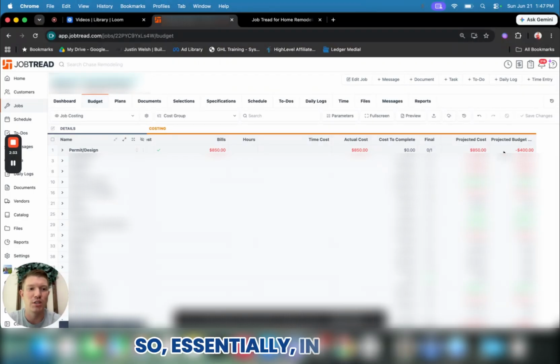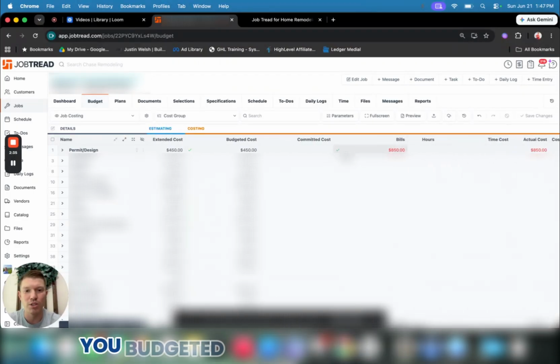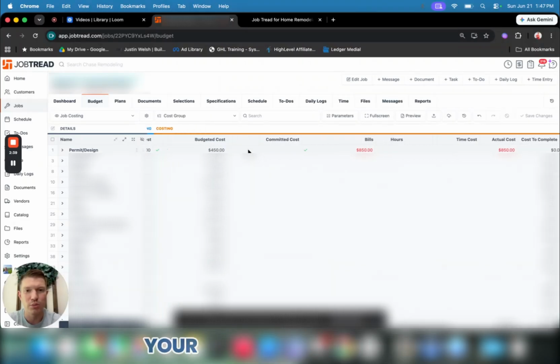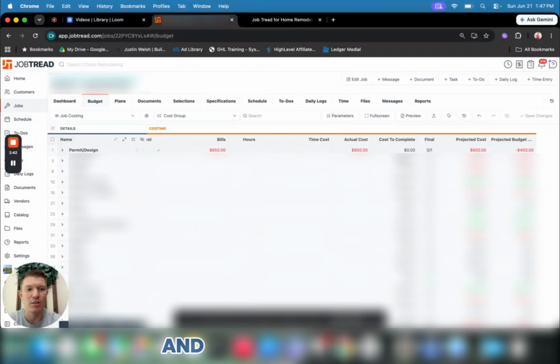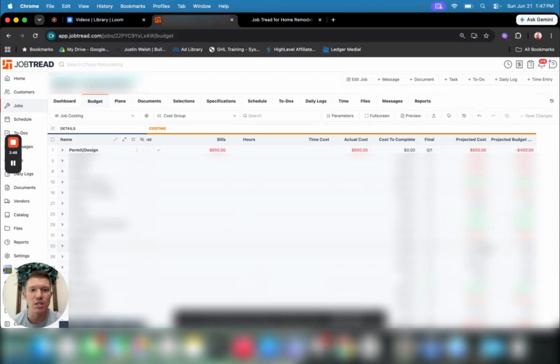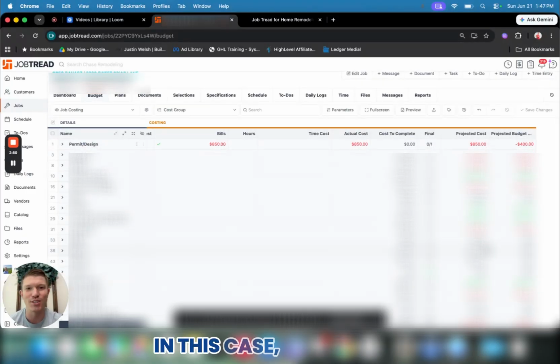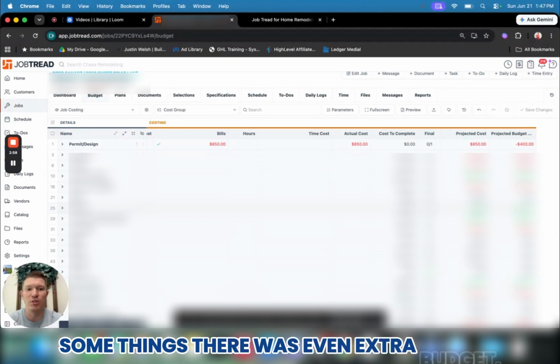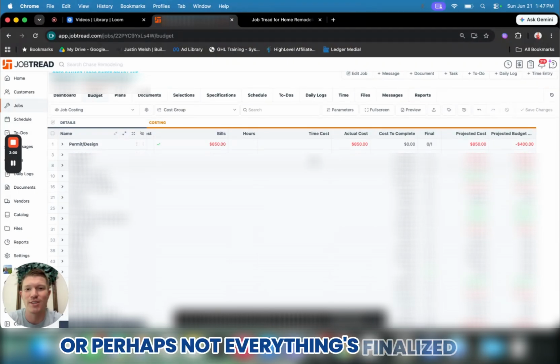So essentially, in this case, you budgeted, if we go back over here, your extended cost was 450, your budgeted cost 450, and you've spent $850. So that means you are in the hole $400. And you can see this for each individual line item. In this case, on this job, it was not budgeted super well. Some things were perfectly on track. Some things there was even extra budget, or perhaps not everything's finalized yet.